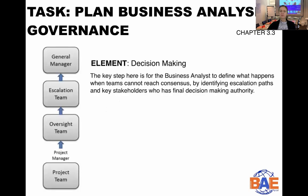Let's start with decision making. The key step here is for the business analyst to define what happens when teams cannot reach consensus, by identifying escalation paths and key stakeholders who have final decision-making authority — especially with bigger initiatives where a lot of people are involved. This is quite an important escalation strategy that you need to define upfront in collaboration with the rest of the project team.